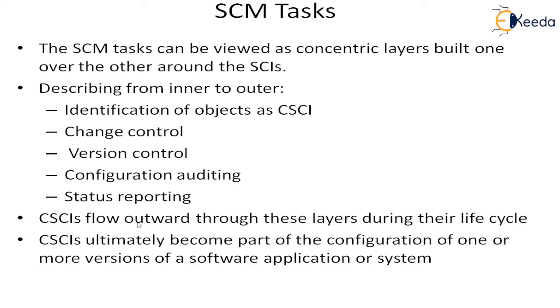The CSCIs flow outward through these layers during their life cycle. So every object that is in the repository will go through these activities. It has to be identified to be in the repository. It has to go under change control. That means it has to come out and get into the development mode and be brought back again. When it is brought back, it has to be version controlled. And for all these things, there has to be configuration auditing as well as status reporting. And it ultimately becomes part of the configuration system of one or more versions of a software application system.